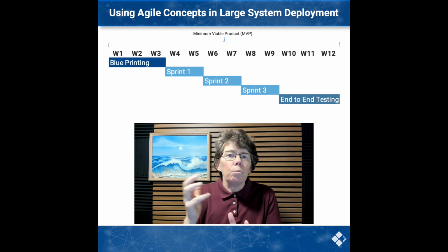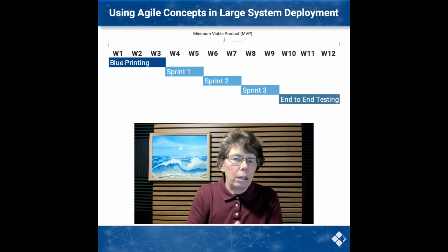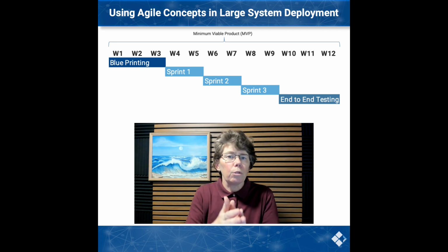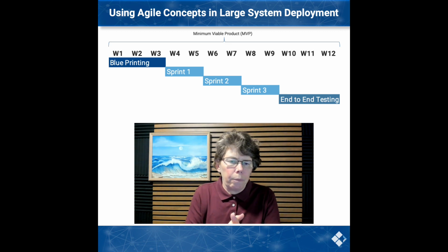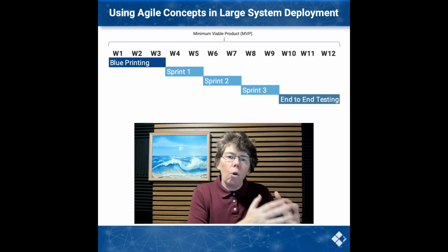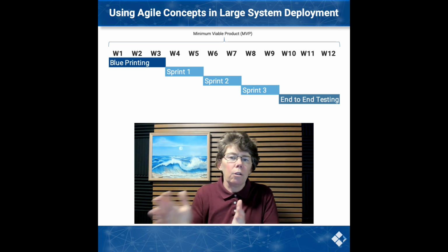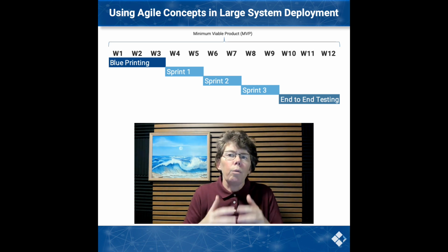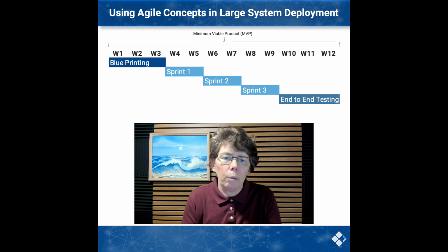The data volumes from the master data are now causing problems. And you realize maybe there's more business cleanup that has to happen on the master data. There's more IT work because of performance issues, right? So if you build that stuff up early in the front end, you're always testing with the security model you're going to deploy. Actually, the security model you're going to bring into your end-to-end testing and ultimately deploy, and you're testing with the volume of master data, at least, that is representative of what you will wind up with.